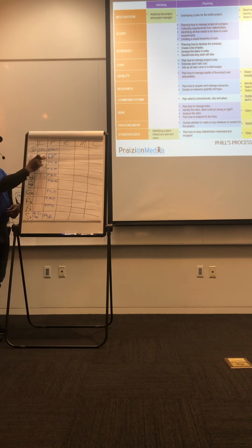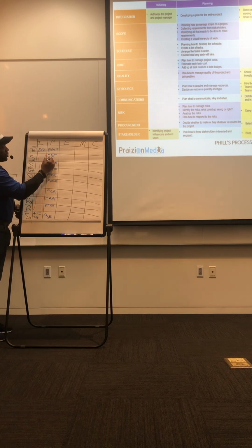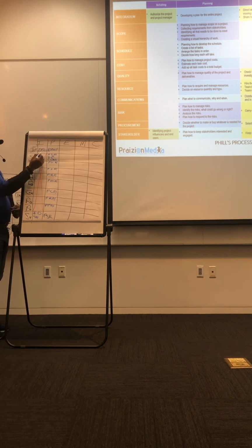Someone gives you this outlandish requirement, and you're like, oh my goodness, you know how much coding that's going to take? It's an example of requirements begetting scope. So collect requirements is the requirement from the customer. Define scope is the work we need to do to get the requirement done. And then we have create WBS. We talked about this. So there's a flow to this. They kind of feed into each other. Because we plan scope management, we know how to collect our requirements. We've got a defined scope approach, and then we know that the WBS comes next.